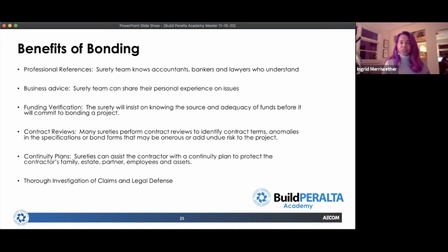So I've really mostly spoken already about the necessity of bonding. And again, even though it's really being secured as a requirement to protect another party, one of the ways that the bond benefits you is that if someone does allege that you defaulted under a contract, the bonding company doesn't just show up with their checkbook. They're going to do an investigation first. They don't want to pay a bogus claim or a claim that they think is not accurate. So they will defend you in the sense that they don't agree that you failed to perform or meet an obligation. And so through their investigation, you essentially get extended some protection if they deem that a bond claim wasn't warranted. So that's actually a benefit to you.